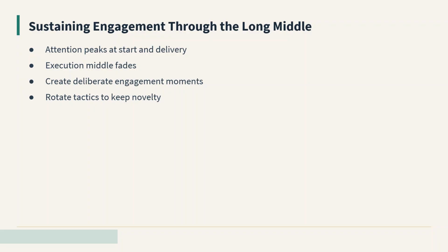Create deliberate engagement moments throughout execution. Milestone celebrations, even small ones. Demo sessions of working increments, even unpolished ones. Feedback opportunities that make stakeholders feel their input is shaping the work. Decision points that require active participation rather than passive review. Rotate your tactics so engagement does not become routine.